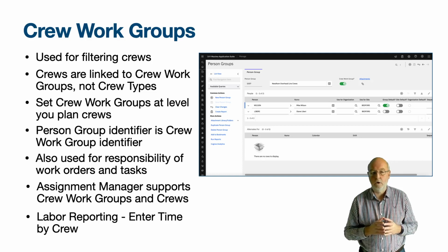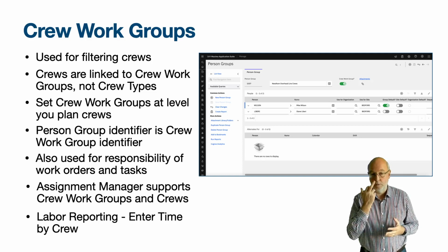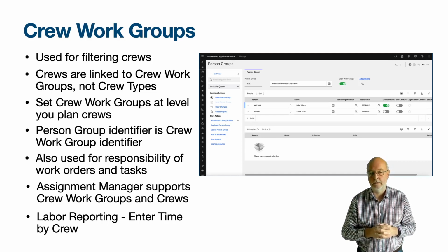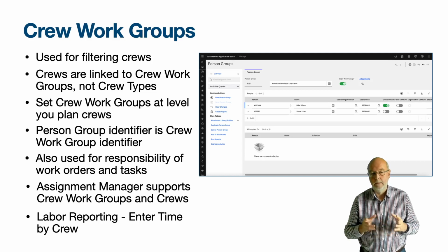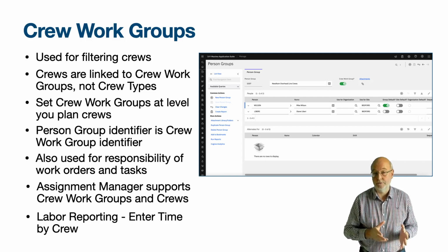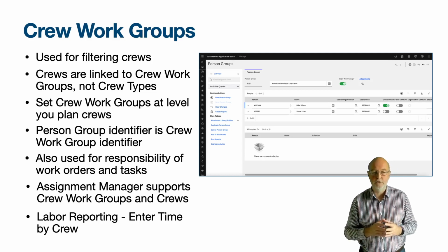In this dialog on the work order tracking application, when you enter a new row in the work order assigned to crew table window, it defaults to the current work order and you enter the start time and end time, and the actual duration is calculated. In the labour reporting version of the dialog, you can enter multiple work orders, as if you were filling in the time report at the end of the shift.